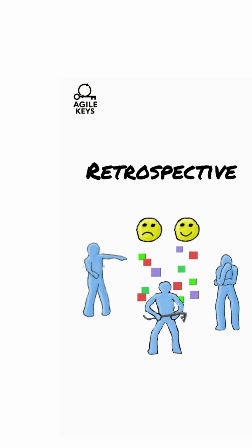Today we are going to look at the retrospective, the Scrum event where the team gets to examine the assumptions that they made at the start of the sprint and whether or not they want to do things differently next sprint. For a 1-month sprint, the retrospective is time boxed to 3 hours. It is for the team and only the Scrum team, a safe space for them to discuss how they worked in the previous sprint. The event may be facilitated by the Scrum Master, as they have a vested interest in the work process.